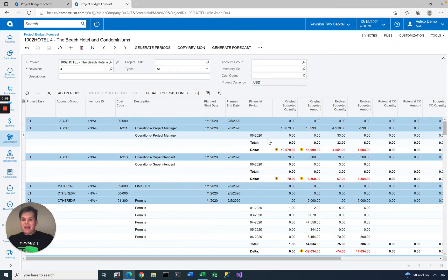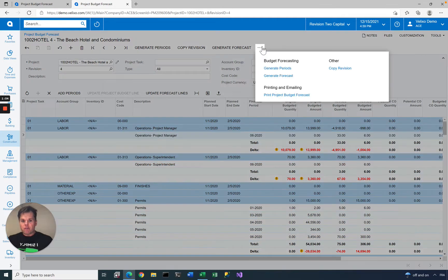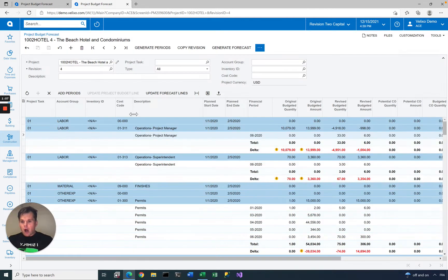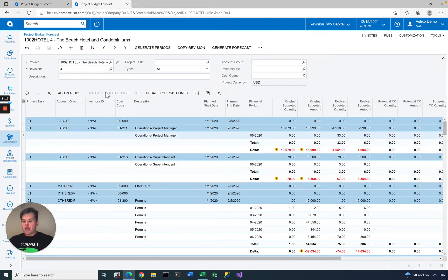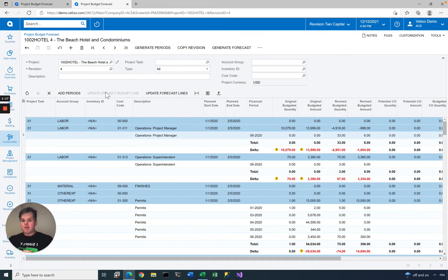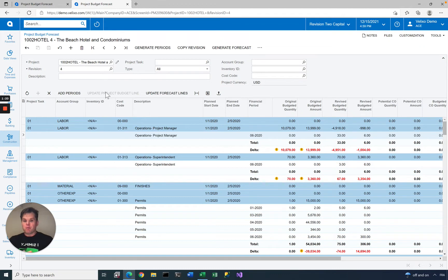You can take any given forecast and make this the project budget. There's a feature from the project forecasting screen that lets you update the project budget line. It's not in this button, but instead it's in the toolbar here. If you make any changes and that is your current project budget, you can take that forecast and make it the official project budget.